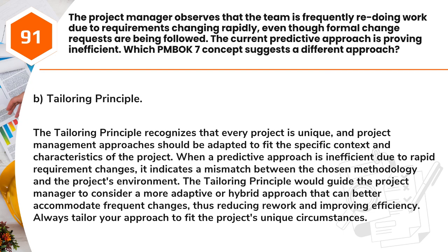Answer: B. Tailoring principle. The tailoring principle recognizes that every project is unique, and project management approaches should be adapted to fit the specific context and characteristics of the project. When a predictive approach is inefficient due to rapid requirement changes, it indicates a mismatch between the chosen methodology and the project's environment. The tailoring principle would guide the project manager to consider a more adaptive or hybrid approach that can better accommodate frequent changes, thus reducing rework and improving efficiency. Always tailor your approach to fit the project's unique circumstances.